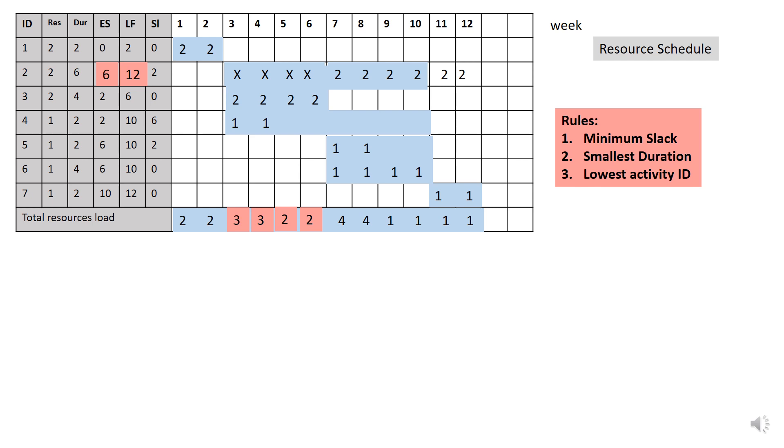So the new early start and late finish for activity 2 is 6 and 12 respectively. While the slack has been shifted to the next 4 weeks, thus it has become as negative 2.